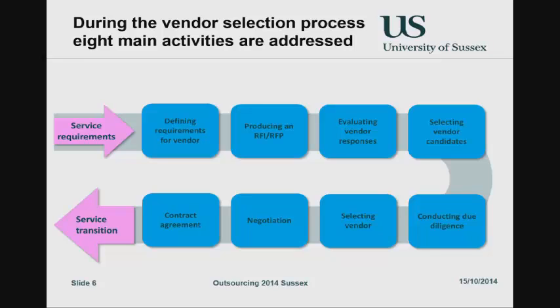They typically need to be posed in statements of work, a familiar term, basically a list of what you need in detail from the supplier, and what they need to do in terms of the management, in terms of the specific service deliverables, listed in detail. Not vague, not high level, but this is what must be done.